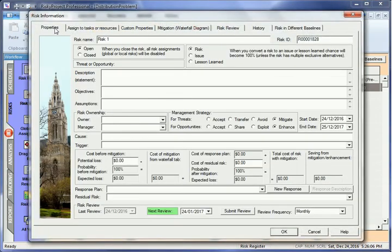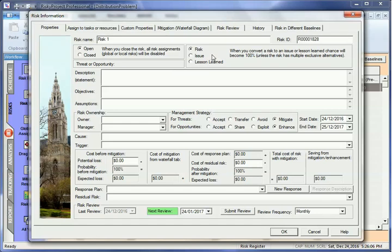The Risk form allows you to provide additional information about the risk, including Description, Risk Lifecycle, Owner or Manager, and Management Strategy.